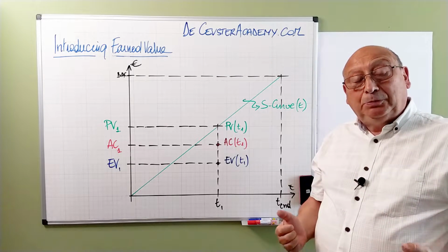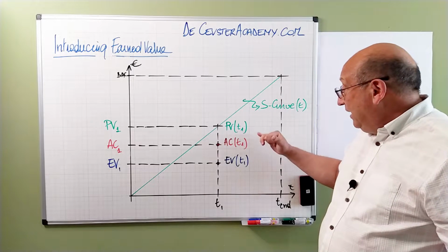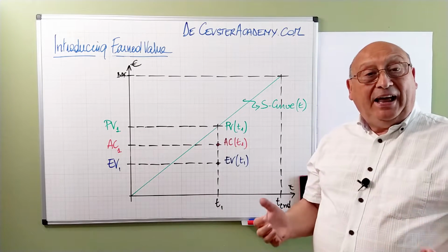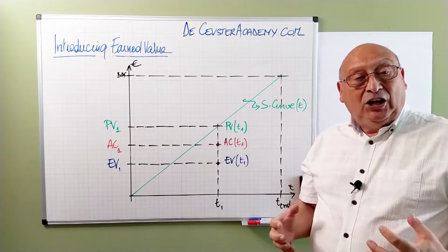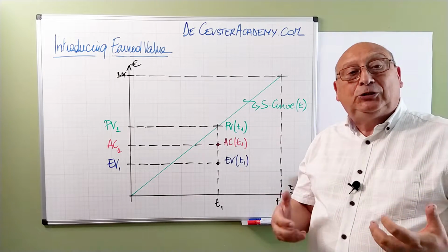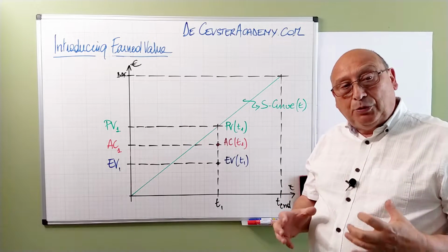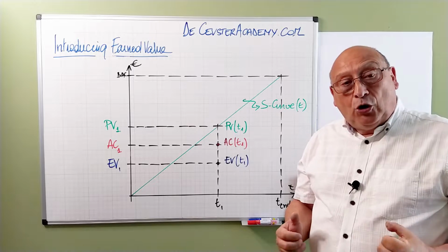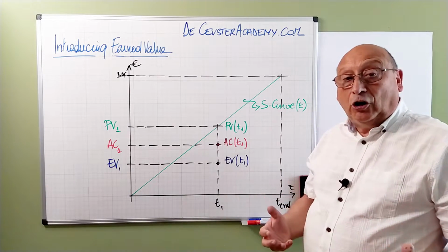In project management, we put another parameter in addition. We have to compare the earned value with the planned value. And the planned value is basically how much value I expected to earn at this moment. So based on these parameters, we will create formulas. We will evaluate projects based on schedule and cost.